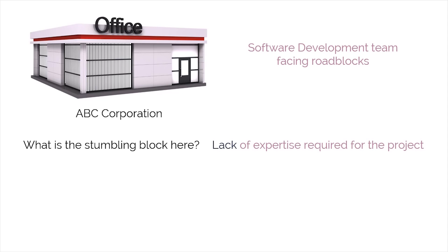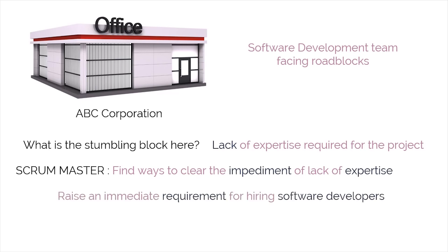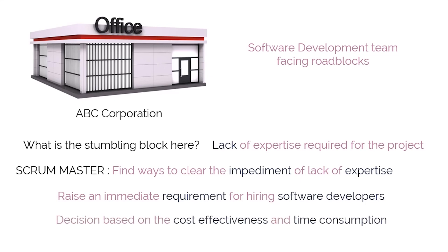This is where the Scrum master steps in. The task of the Scrum master will be to find ways to clear the impediment — the lack of required expertise. The Scrum master will either raise an immediate requirement for hiring software developers with the required expertise, or make an arrangement for training the existing staff, making a decision based on cost-effectiveness and time consumption.